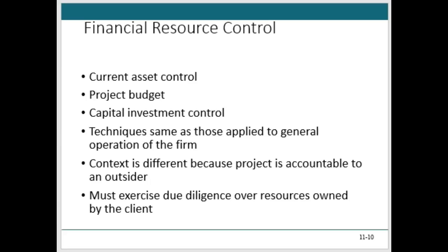And so due care and due diligence are important aspects, but especially back to financial resource management, right? The Sarbanes-Oxley Act and other government regulations are mandates today because people didn't have good financial resource control. It's why we don't add management reserves to our project. I've known project managers do that. I'll throw in another 5 or 10%. No, that's not financial resource control, right? Because you're not learning lessons. You're not managing your budget. You're not offering explanations and doing root cause analysis to request the funds that you might need. So that's financial resource control.